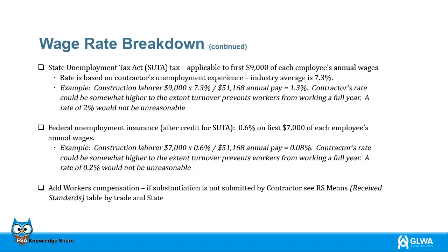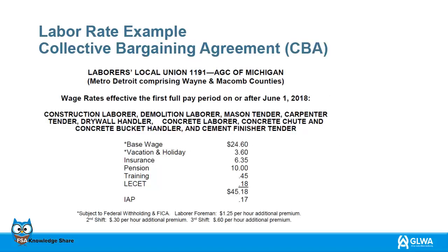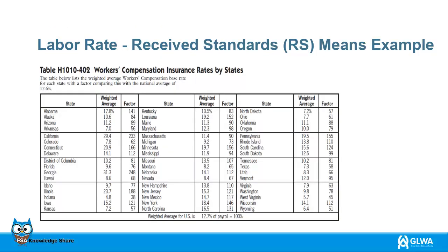Add workers' compensation, if substantiation is not submitted by contractor. RS Means, Reed Construction Data standards, table by trade and state. Labor rate example of a collective bargaining agreement, CBA. Labor rate, RS Means example.